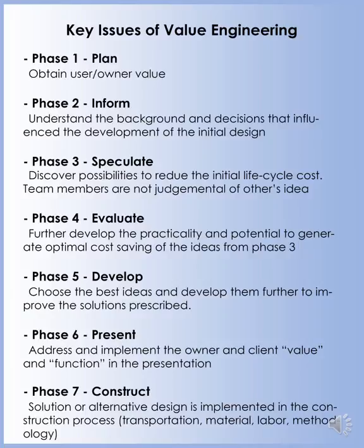In the development phase, the team chooses the best ideas and develops them further to improve the solutions prescribed. In the presentation phase, the team addresses and implements the owner and client's value and function in the presentation. In the final stage, the team selects a solution or alternative design that is implemented in the construction process.